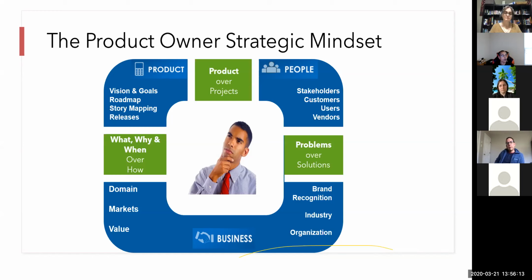And then from there, we start digging into a little bit more story mapping or epic mapping, if you will, and writing those things out, putting it up on the board, getting it very visible. I suggest to product owners to have that up there so they're always seeing it, because it's going to change almost daily in a sense in some cases. And then as they go through each sprint or each quarter, keep looking at your story and your roadmap and making adjustments as you go along.